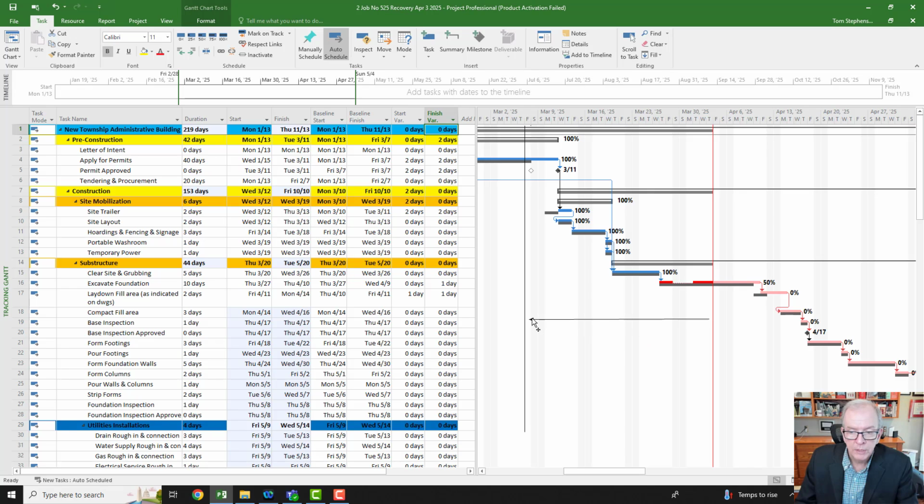And what I should say is with the recovery, right, what was I doing? This arrow would not have been this way, it would have been this way. I was only looking forward. A recovery only looks forward. It's not looking into the past. That's what the update is for. That's why we have a separate update file.